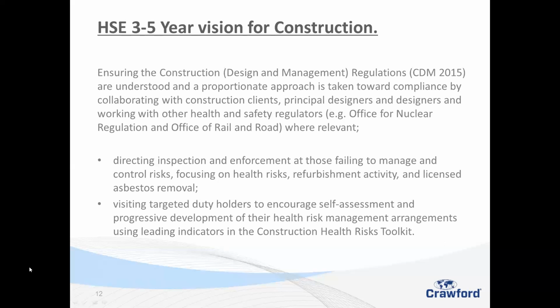Okay, is there a basic template available which would help people to create their own CDM for each construction project? And also, is there guidance on what is a CDM site and what is not? As I said, all construction sites come under the CDM regulations. Yes, there are sites out there on the web that can provide you with CPP templates, but remember, you can't create a CPP without pre-construction information, and that's another thing a lot of people forget.